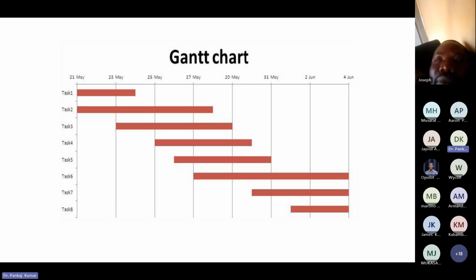Gantt charts don't indicate task dependencies or critical paths of a project in detail. Users cannot tell how one task falling behind schedule affects other tasks. The PERT chart, another popular project management method, is designed to do this. Gantt charts are good for providing a high-level view of project workflows. However, they can leave some things to interpretation. This is especially true for large-scale IT projects, where certain details about priorities, deadlines, and expectations may be left out of the high-level view of complex projects.